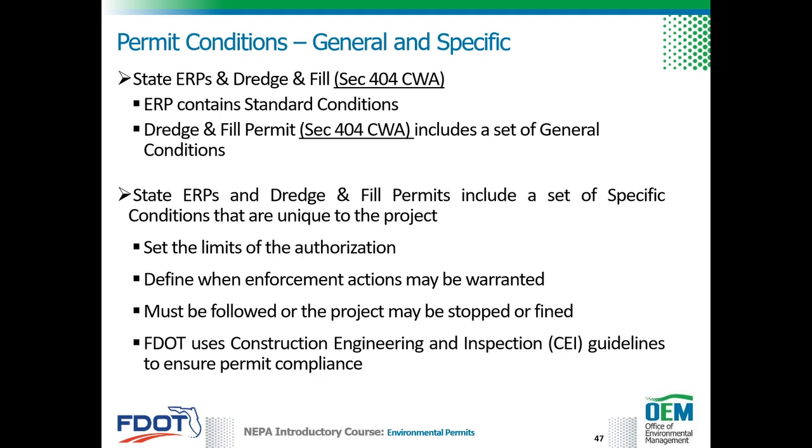Specific conditions are unique to the individual project and are as variable as the different road and bridge projects that exist throughout the state. It is especially important to note the specific conditions for each project, as these conditions set the limits of the authorization and therefore define when enforcement actions may be warranted.